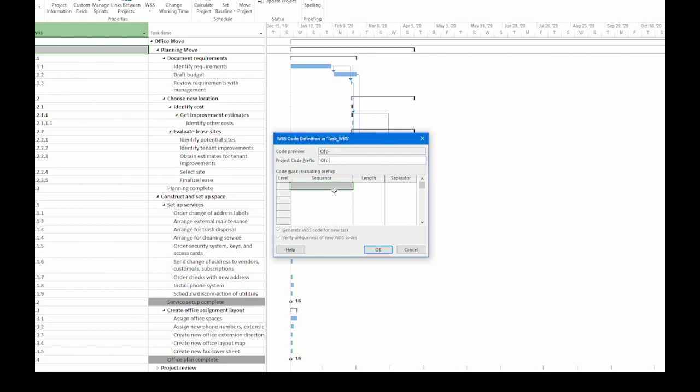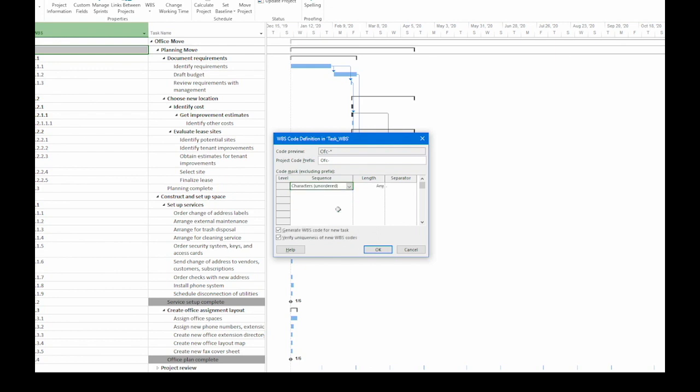Now that we've got the prefix, let's drop down to the actual code mask. I'm going to click the first sequence cell and click the down arrow. There are four options. I'm going to start with characters unordered. This is going to be a mix of numbers and letters. I can type in what I want. Project doesn't fill in the values, doesn't increment the values, but it's great for abbreviating phases. For example, like PLN for planning.